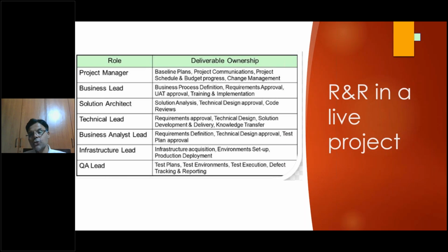So there was another role called architecture owner or program manager, but we added it only later, at a later point of time. However, we had a nice learning on this because that was not the right approach. Why? Because we realized these roles are also required, such as a program manager role in such a large project. I thought that a project manager probably could do the job, and that's what I was probably hired in the company to do, to manage that project as a whole, and the whole team is mine. But that was a wrong assumption. Probably even the sponsor had that. So that was a nice lesson learned for us, and we moved on.